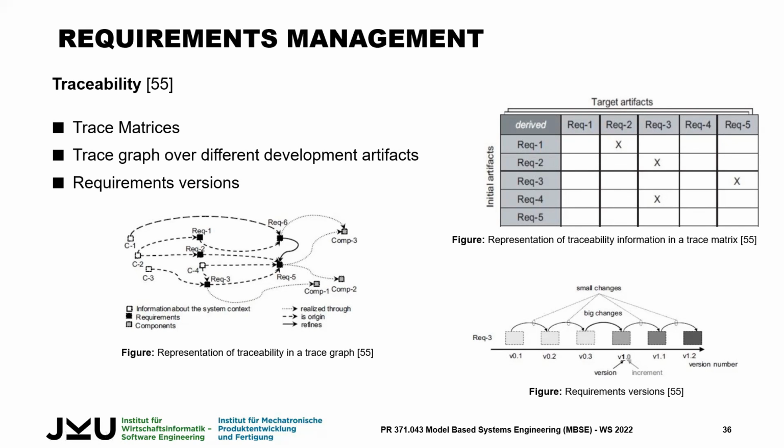So there is also a versioning guideline, like small changes will be 0.1, 0.2, and big changes will be version 2, something like this. So these are the methods, it is not that you have to, but I think it is better to follow, because then the whole team will have a common understanding. It also makes sense to me, if the big increment is 1, and the small one is like 0.5, that also works. It depends on the users.